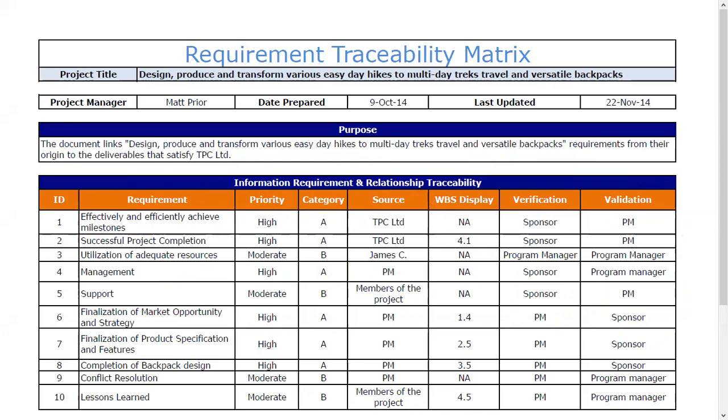But we had a section there where each one of those 8 folks would have to indicate that they have not only approved the requirement, but they tested the requirement before it was approved. And that's what your requirements traceability matrix is meant to do. We had that process locked down pat.